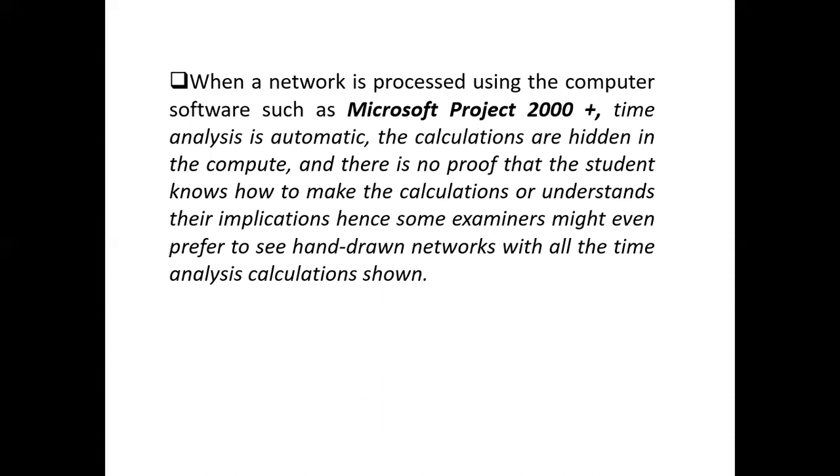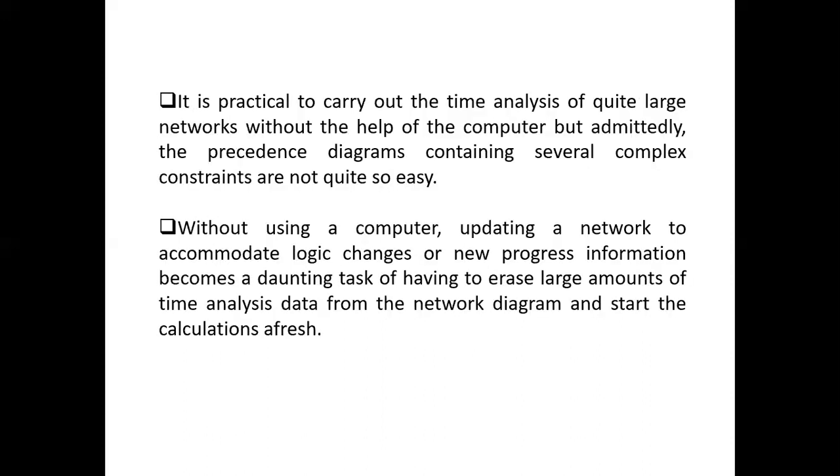For us to do the practical aspect of this, it is practical to carry out the time analysis of quite large networks without the help of a computer, but admittedly, precedence diagrams containing several complex constraints are not quite so easy. So in this case, we do not agree with you if you don't use the computer when it comes to big and complex projects, because of the calculations and the figures needed for you to know the critical path and to calculate the float of the project.